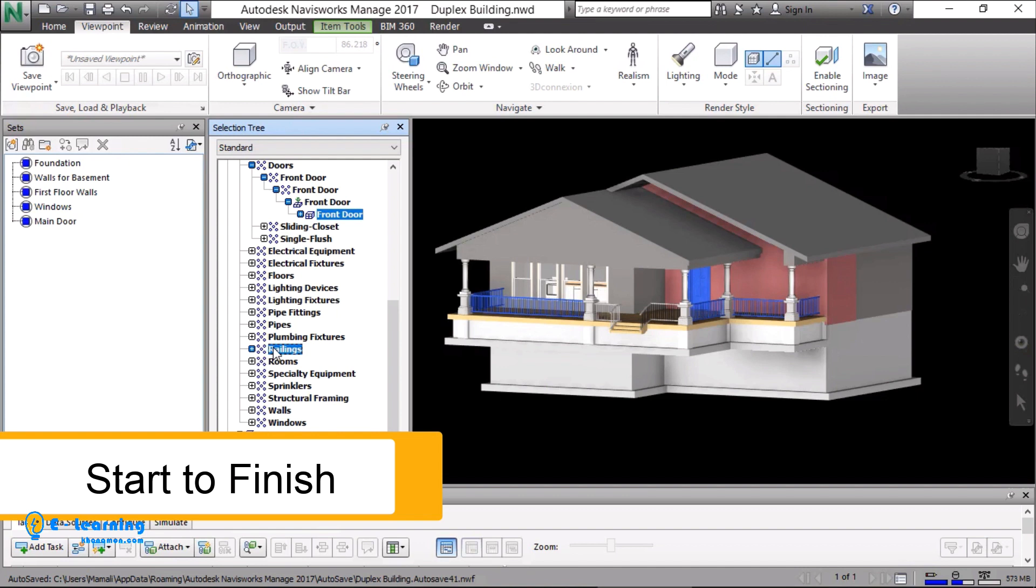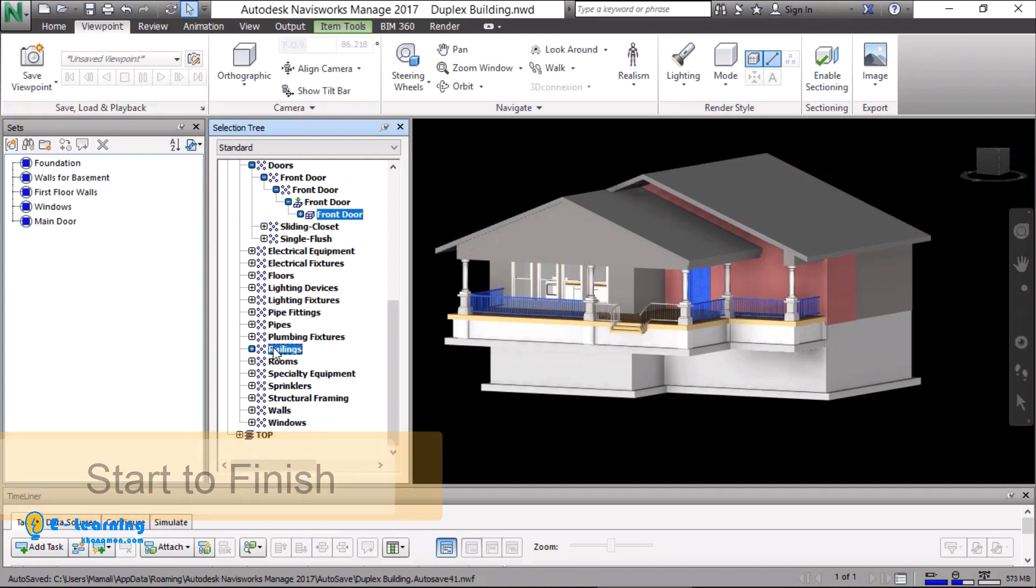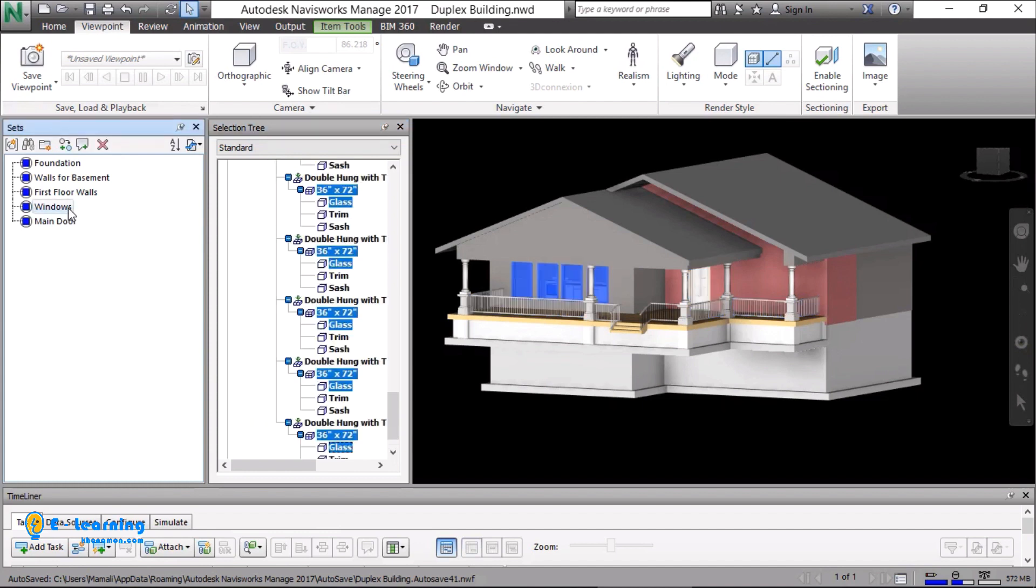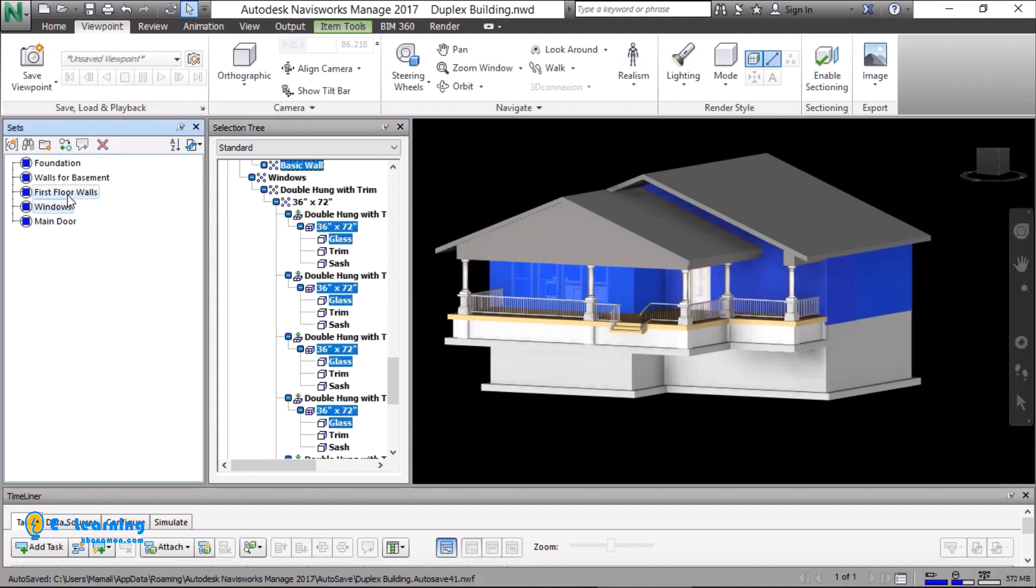Start to finish is the reverse form of finish to start. In our example in finish to start, I selected windows and linked it to the walls with finish to start. Here, I do the reverse. First, I select the wall and link the wall to the window with SF.